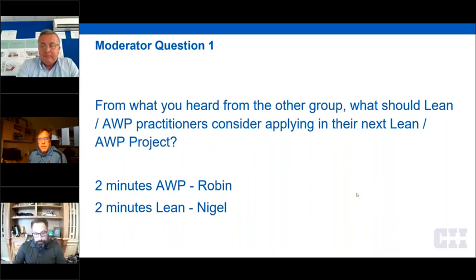I see that what Robin was showing earlier, the packaging strategies and developing bits of things in terms of very discrete physical type elements. And I think AWP lends itself to DFMA as well, because you need that structural rigorous approach, because if you make it off-site and bolt it together on-site, it needs to be right when it lands, and it needs to be in that structured manner. So I think there's massive commonality there.